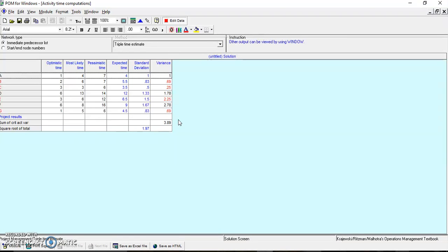Okay, it is 0.9357. Now, it's worth noting also that if the question I'm asking is, how about my probability of getting it done in 17 days, the equation changes, and I would still have that square root of 3.88 in the denominator, but in the numerator, since the first number is smaller, I'm going to look for 1 minus 1.52. Whenever I'm asking the question, what's the probability I can get it done earlier, then I put that smaller number, which in this example is 17 minus 20. I still get a 1.52, but it's a negative 1.52. So to find the answer, I would say 1 minus what I find on that chart on page 617. That would be around 7%. It would be 1 minus 0.9357 is the bottom line there.